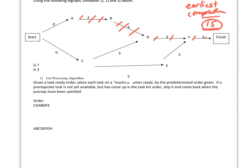So with a list processing algorithm, what happens is that they're going to give us tasks in a certain order. So for instance, I've given you the order here, say for instance that the boss thinks that this is the best order to try to put this stuff in, or this is the most important order, whatever, or by experience we find out that this is what we need to do. Now that might not always work because if I have D here, D has certain prerequisites, and one of them is not E, and so we just have to go through and figure out if this order does work.